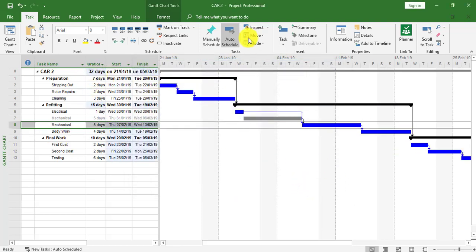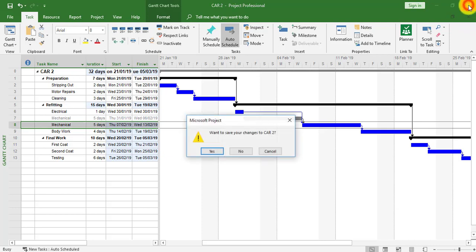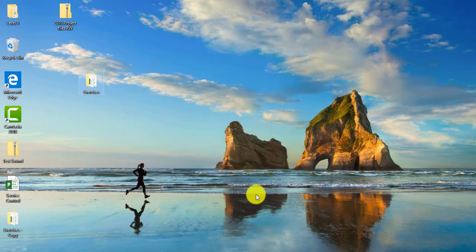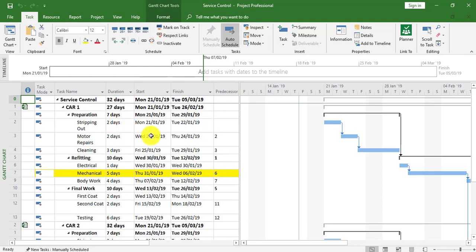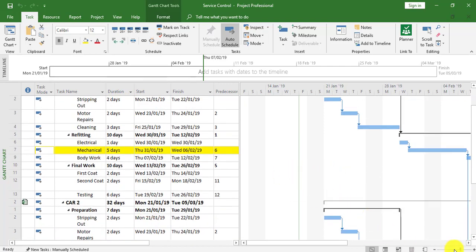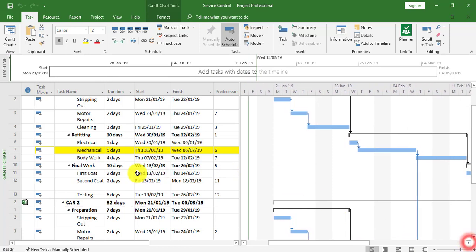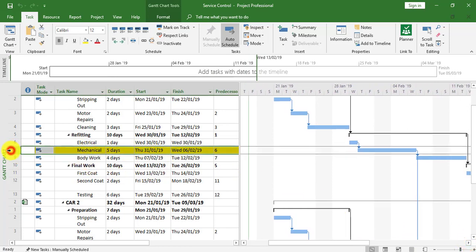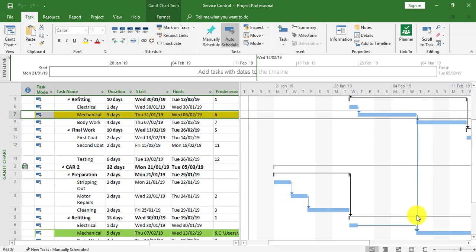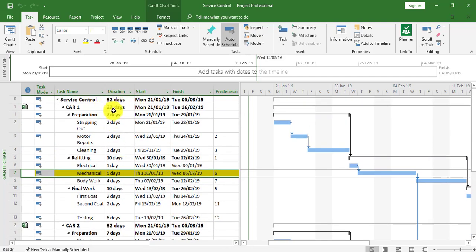Clicking OK, it now shows a change to 32 days in the Car Two sub-project. I'll save this and then open up the master project — Service Control. We can now see straight away within Service Control that the link has been accepted. Looking at the two bars, the yellow mechanical task within Car One now has a finish-to-start link with the mechanical task within Car Two.